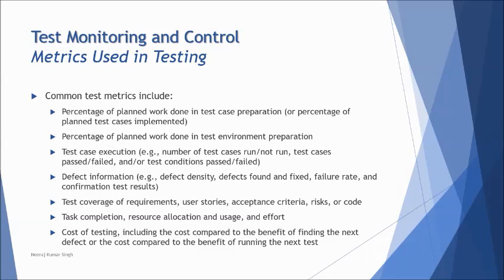There are also processes which can be measured with metrics, but we are not going into those details here. The examples given are just to illustrate what sample metrics could look like. For example: percentage of planned work done in test case preparation, percentage of planned work done in test environment preparation — generally measured as hours allocated versus hours utilized. Test case execution measures how many test cases have been executed versus the planned execution rate. Defect information, test coverage of requirements, user stories, acceptance criteria, risk or code, task completion, and cost of testing are among the many other test metrics used throughout the process.